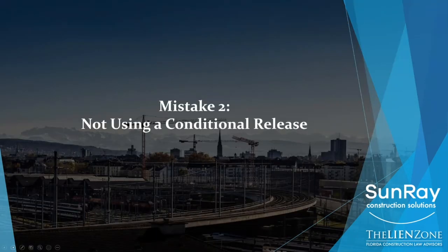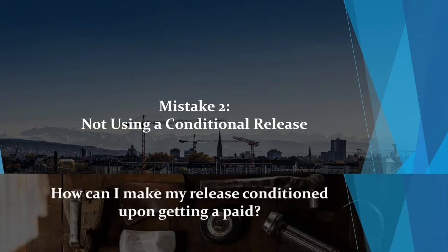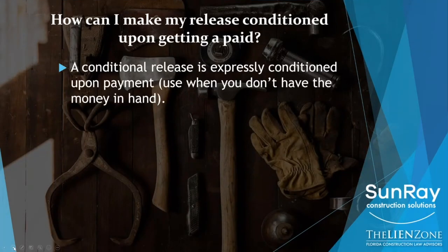So let's talk about mistake number 2, not using conditional language in your releases. So a conditional release is a release that is expressly conditioned on payment. So you want to use this when you don't have the money in hand, either when someone promises to give you a check, or you have a doubt about whether the check is good or not. And as a result, you want to make sure that this release is only good if the check arrives and clears. So how do you do that?